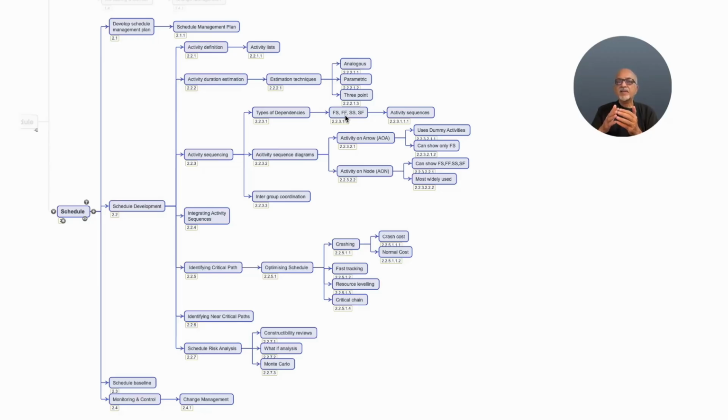I may start tiling work when the flooring is 30% completed, but I will not be able to complete the tiling unless and until the flooring is 100% completed. Something must finish for me to finish something else. Unless and until the coding is completed, I will not be able to complete testing.